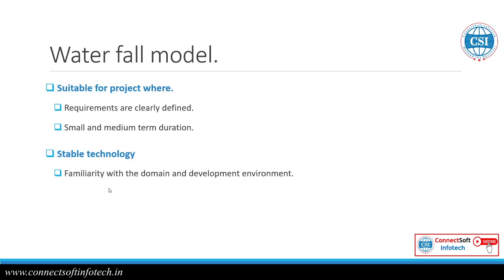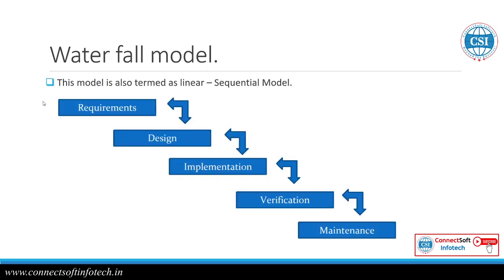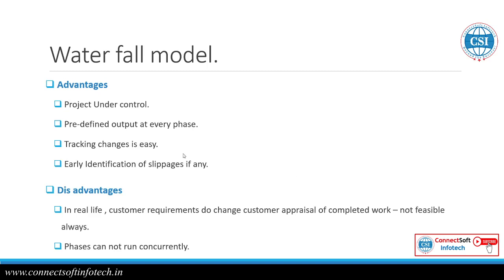This is suitable for small projects where the requirements are clearly defined. If the requirements change, we need to follow the entire stage again and again. In the waterfall model, the complete requirement is finalized and signed off, then we go for designing. After designing, we complete that, then implementation, meaning coding. This is the waterfall model.